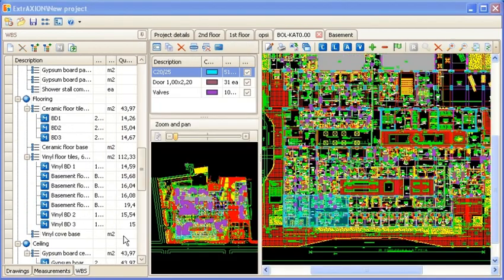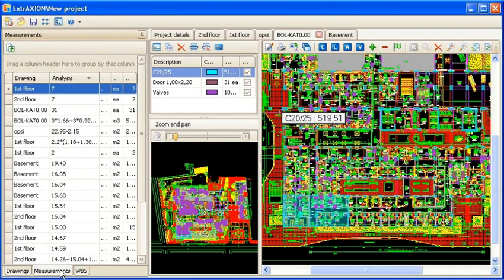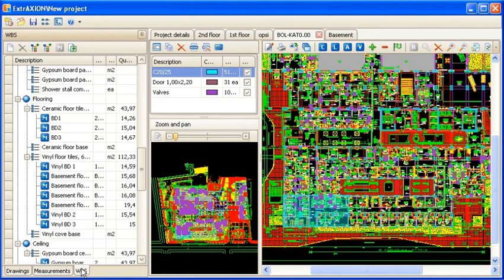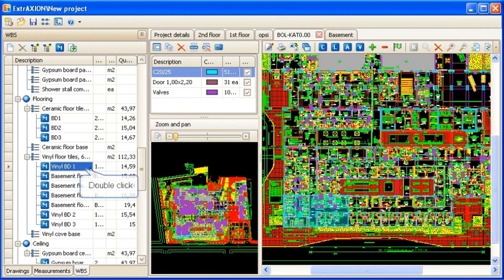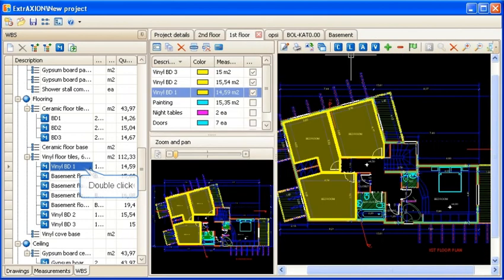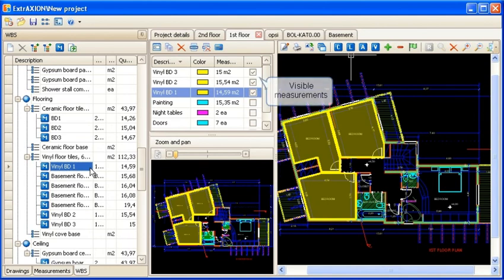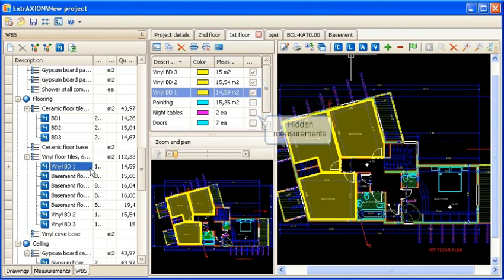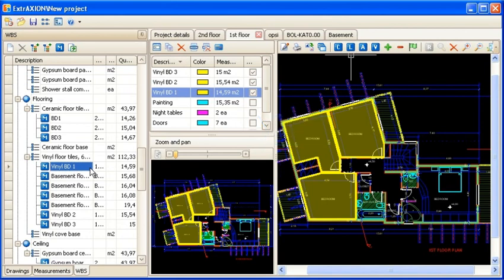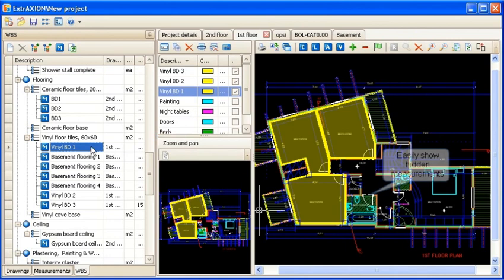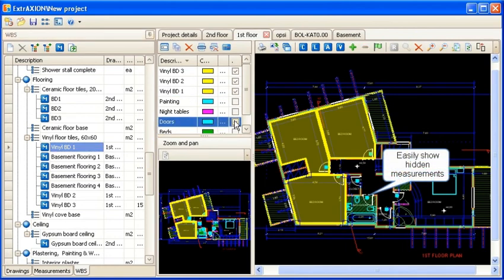The measurement results appear in the Measurements tab and are affiliated with their corresponding work items. They are also directly linked with the actual measurements on the drawings. For instance, you can check which measurements of a certain work item have been completed. Double-clicking on the measurement of the work item in question opens the drawing to which this measurement refers, if that drawing is not already open, with all related work item measurements activated, while unrelated measurements are hidden. This enables you to spot sections which may have mistakenly been left unmeasured. Hidden measurements can easily be reactivated.